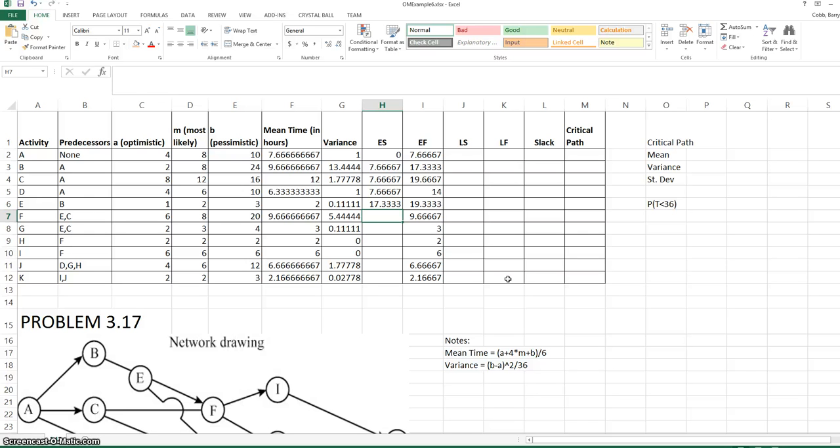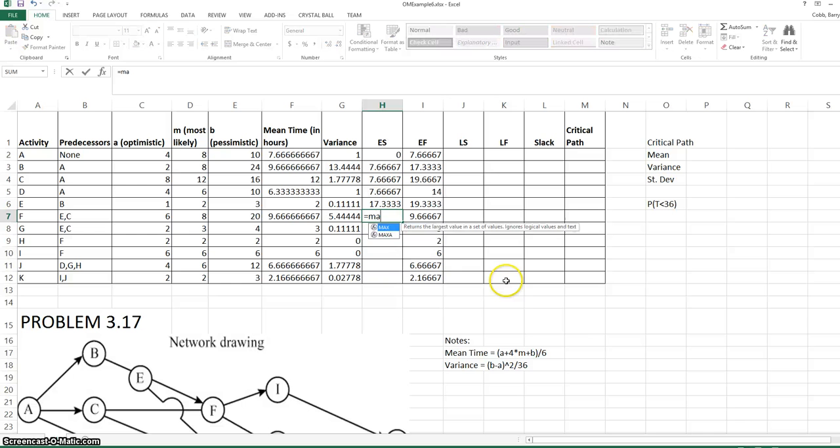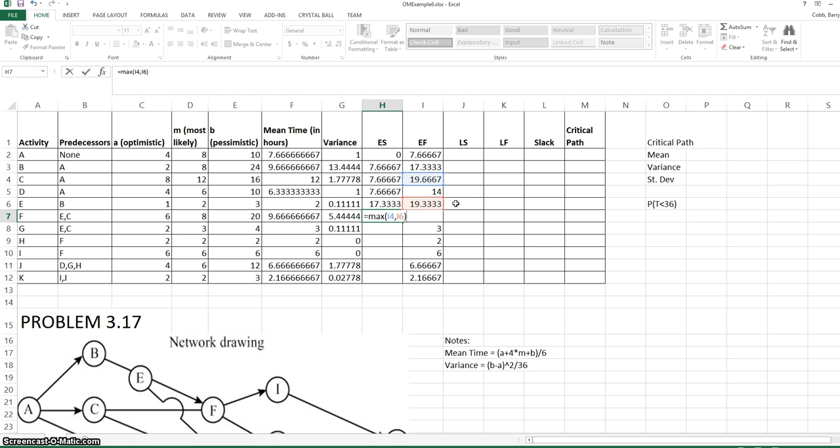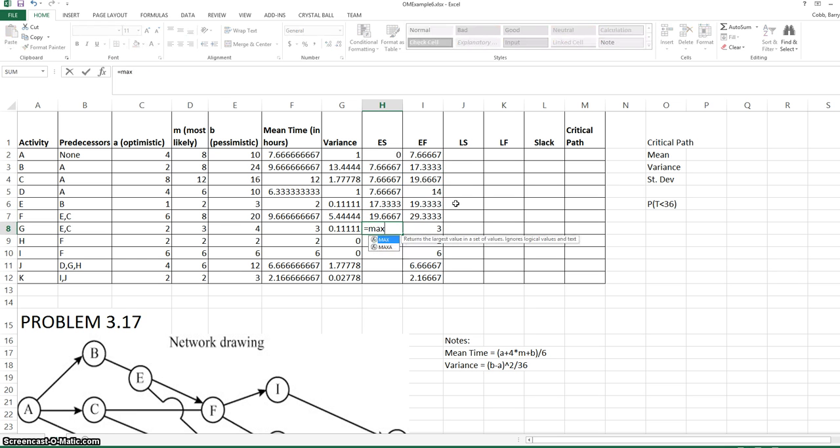The early start time for E is the early finish time for B. Activity F has two predecessors, E and C. So the early start time is the maximum of the early finish for C and the early finish for E. Intuitively, if both of these activities must be completed before we can start F, the early start for F would have to be the longer of the two early finish times. The early start for G is calculated the same way.